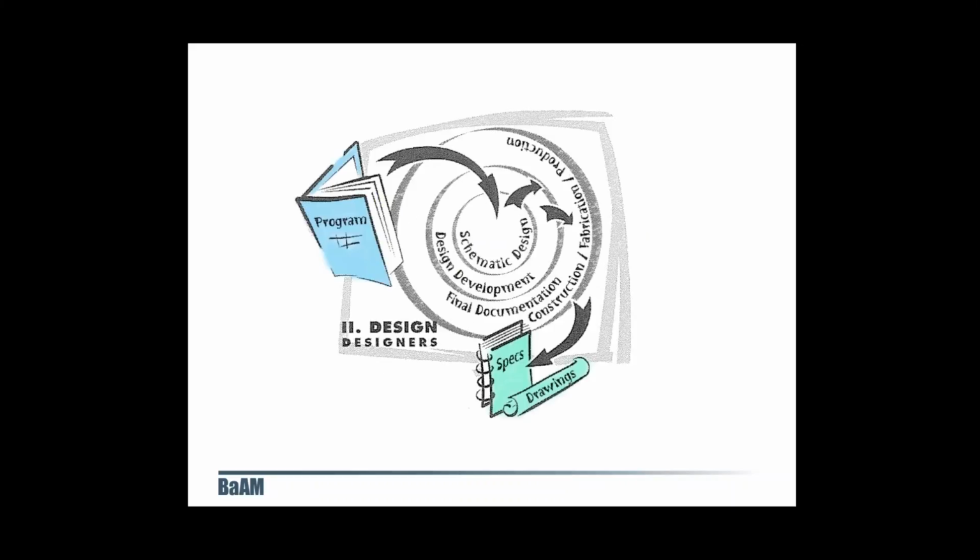Now, depending on the size of the project itself, design development can become quite extensive. This diagram illustrates how design typically begins with schematic design, getting ideas onto paper so that the team can begin detailing and shaping the initial creative thinking. The design will evolve from schematic design into further design development, adding more and more details, to the point when final documentation and construction documents can be created, providing exact details and production instructions for the final product.